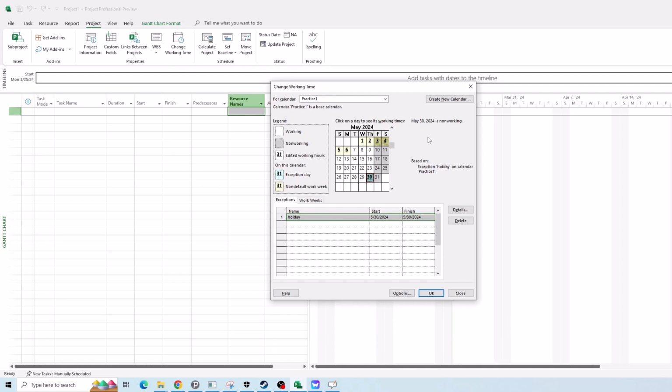As you can see here, no date. You can use this and select a day and create a new one, or it doesn't matter, it's up to you. Holiday 2, or you can create the record and then change the date here. It doesn't matter. When you create an exception, you can make it, for example, 2 days. Just add start to finish. It will apply for 2 days. Okay.